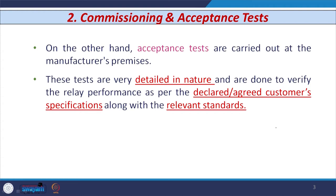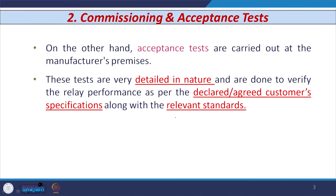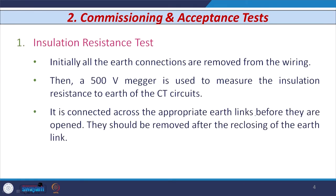The acceptance tests are carried out at the manufacturer premises, whereas the commissioning test is to be performed at the customer premises. These tests are detailed in nature and have to be done at the customer's premises, carried out as per the agreed or declared specification mentioned in the purchase order by the customer, and based on certain IEEE or IEC standards.